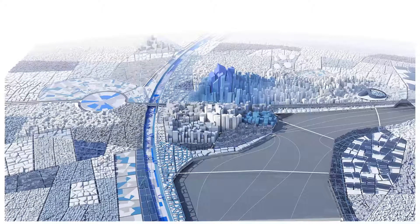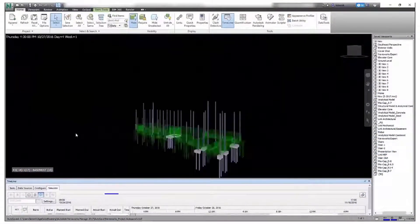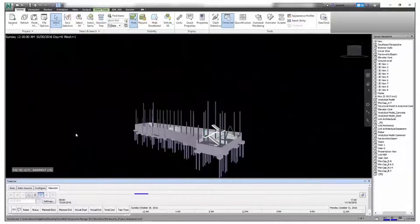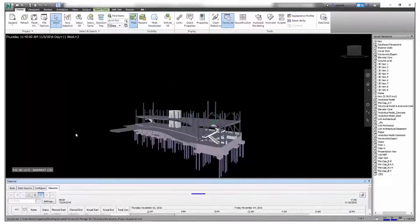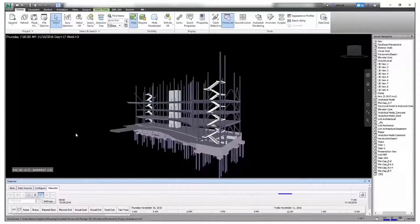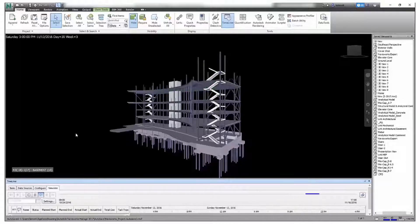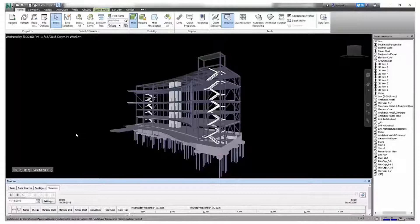Navisworks Timeliner creates 4D simulations — simulations that include time of the construction of 3D models by attaching items in the model to tasks with a start and end date. You can create a simulation that shows sections of the model being added or removed over time according to the scheduled tasks. With Timeliner you can also link objects to tasks in an external scheduling file and synchronize a simulation with the actual status of the project.